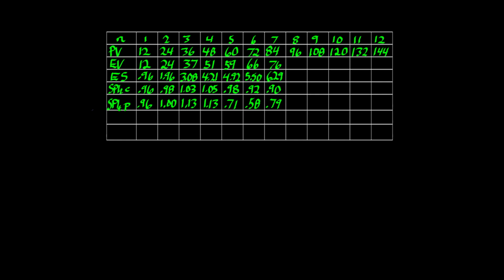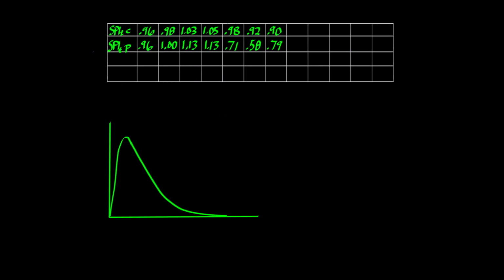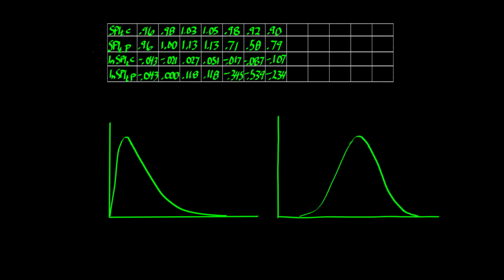Historical SPIT is the basis for statistical analysis, but analysis of periodic SPIT from real projects revealed a problem. The SPIT is skewed. It's not the right shape for statistical analysis. Applying the natural log to each SPIT gives us this. The log data is in a bell-shaped curve that supports common statistical techniques such as sample mean, sample variance, and sample standard deviation.